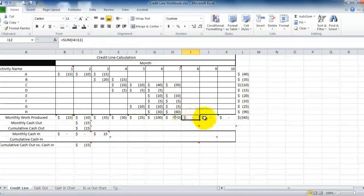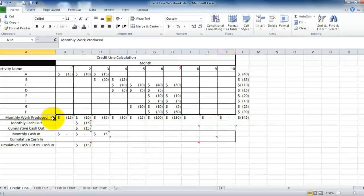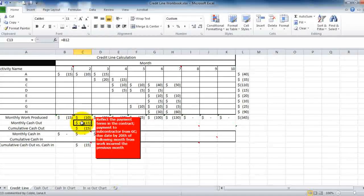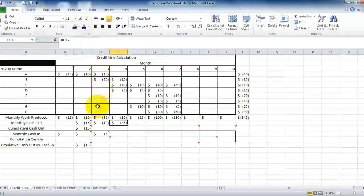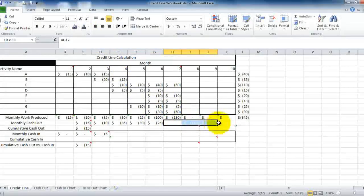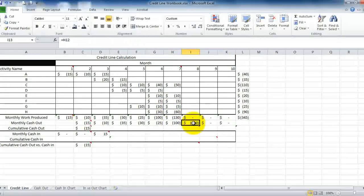You'll notice there are $0 months where no actual work is being produced. I put this row in here so you understand the difference between when the work is actually put into place versus when you have to pay for it. You pay for it the following month — you can see the time that you pay is the month following when the work was done. We carry this all the way through to the end of the job.